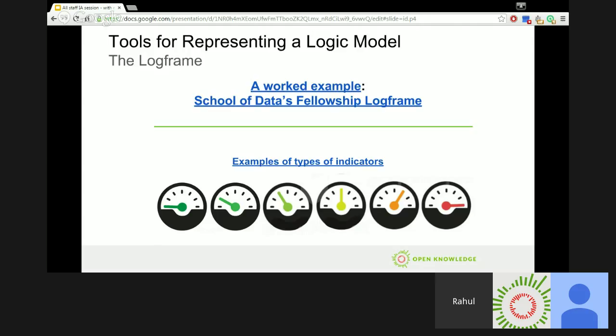Indicators can be of two types, numerical and non-numerical, and that link will show you some examples of those and explain what each of them are. There's a table there. I would say it's often better to have fewer indicators and use only the number required to clarify what must be accomplished to satisfy the objectives stated in the narrative summary column. The rule is the indicator you choose for measuring your objectives must be verifiable by some means, hence the name objectively verifiable indicator, OVI. If they are not, you must find another way.